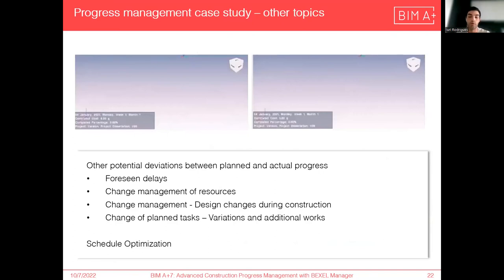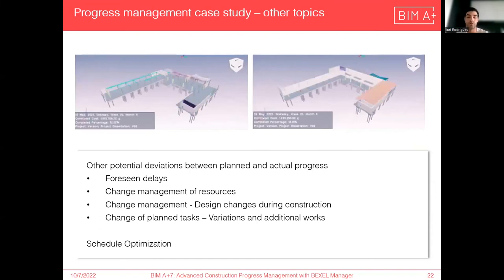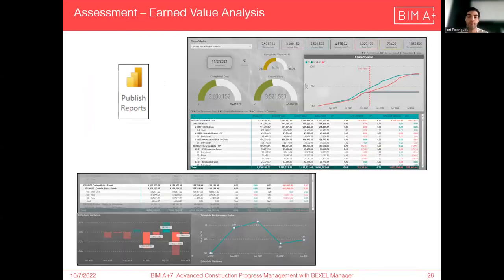These were other causes of deviations during the construction that were explored, such as design changes during construction or additional works and variations. On the top, we can see the comparison between the actual and planned progress via construction simulations with percentage of completion and total costs flow. After updating the schedule and costs, the software enables the automated creation of monthly payment certificates and progress reports for communication. The project performance can also be analyzed through Power BI at the work packages or activities level, enabling detailed visualization of performance and better decision making.